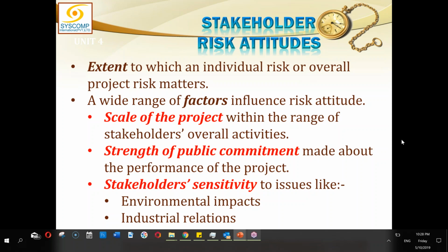In another place, scope may not matter, or it could be any combination. But all three project objectives may have varying demands from the stakeholders for different countries, different projects, and different organizations. A wide range of factors influence the risk attitude: the scale of the project within the range of stakeholders' overall activities. So, how big is this project? What is the scale of this project?